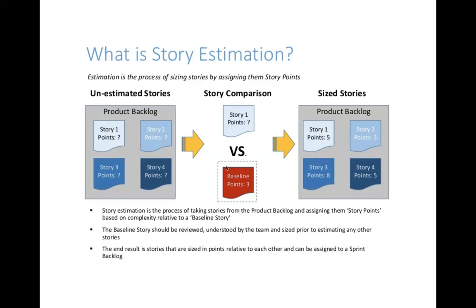Like we did development. Development contains our design time. We did some spike work for that. We did some unit testing. We did some feature development. So likewise, we divided multiple tasks, and those tasks I calculated as 3 points.